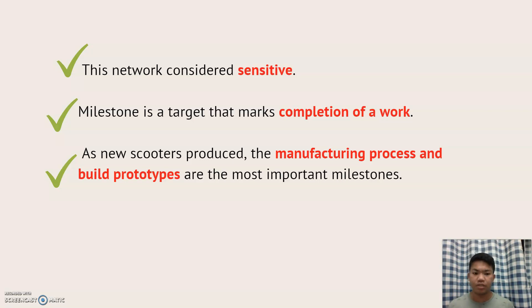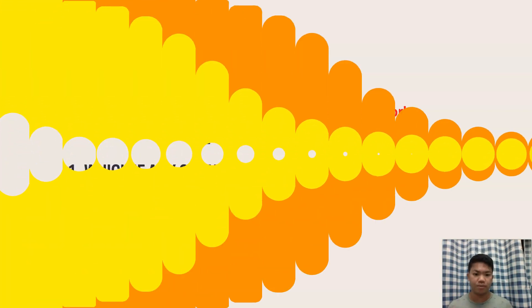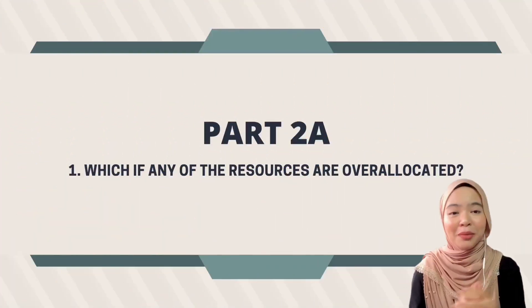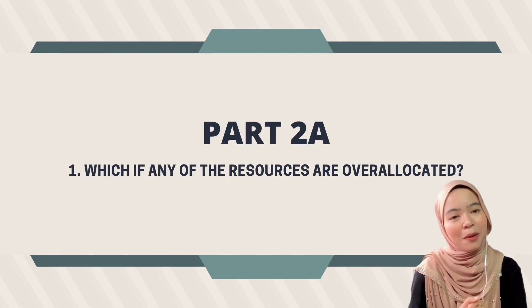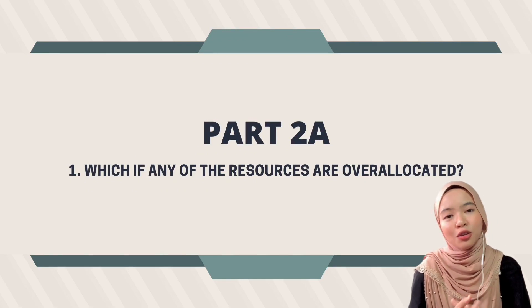We can conclude this network is considered sensitive as it has numerous critical paths. As we know, a milestone is a target that marks completion of work. For this project, new scooter production, the manufacturing process, and building prototypes are the most important milestones.